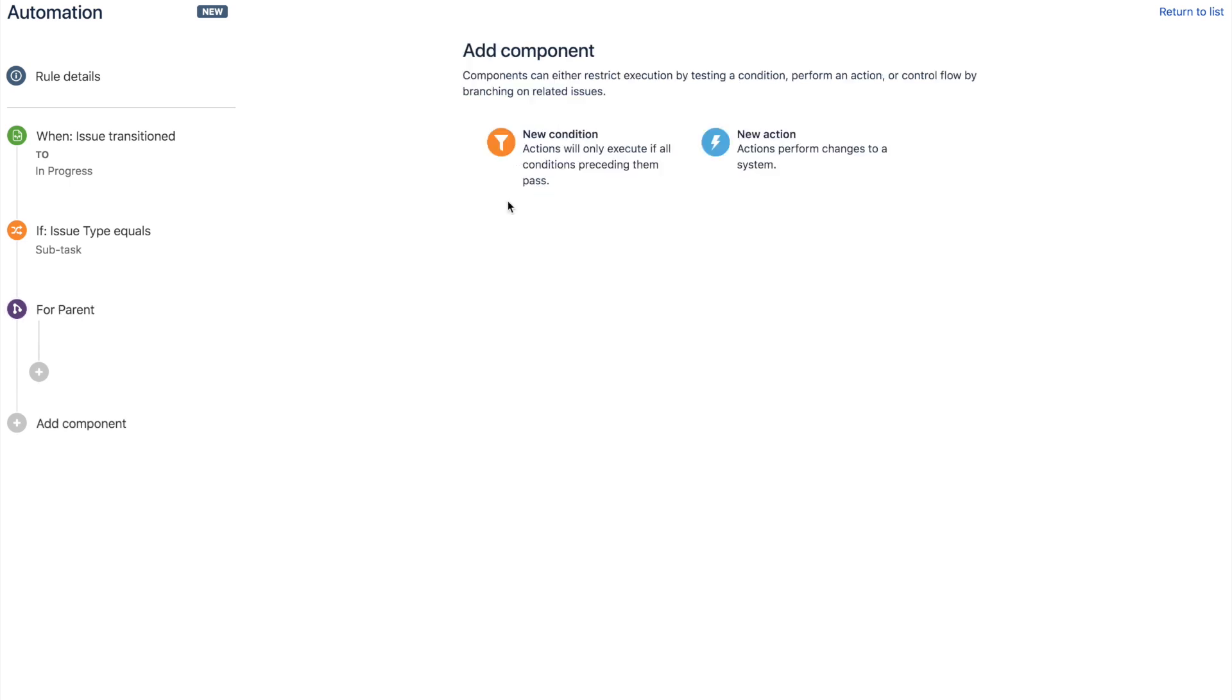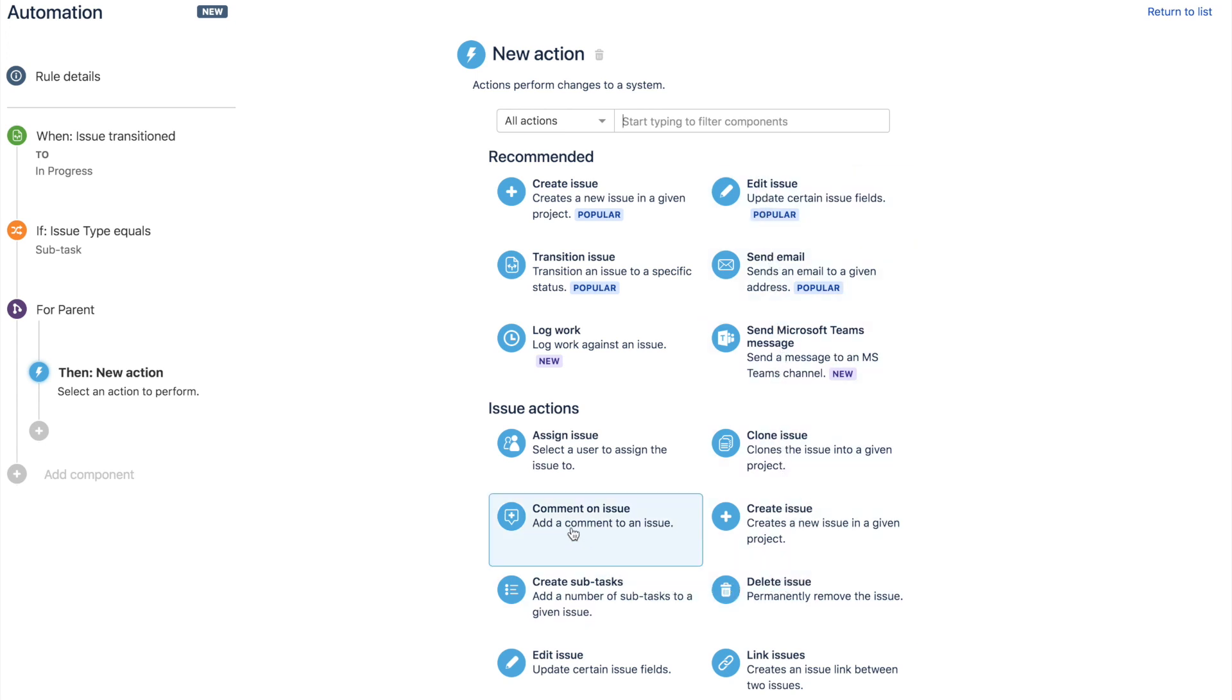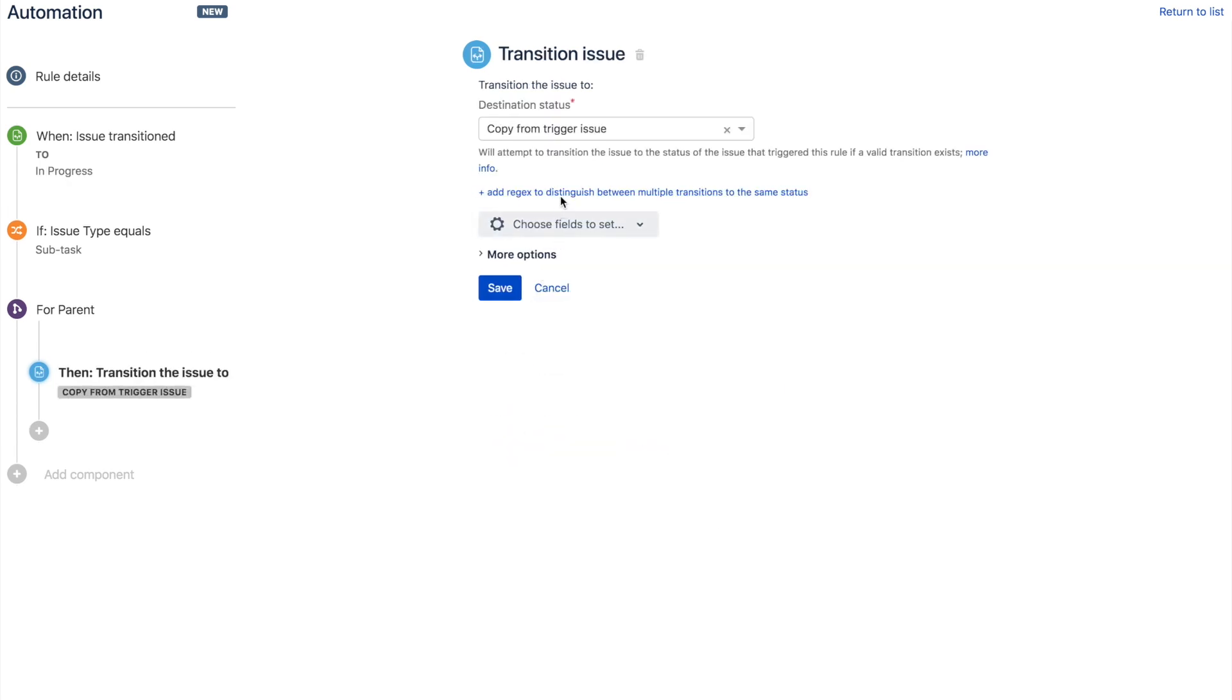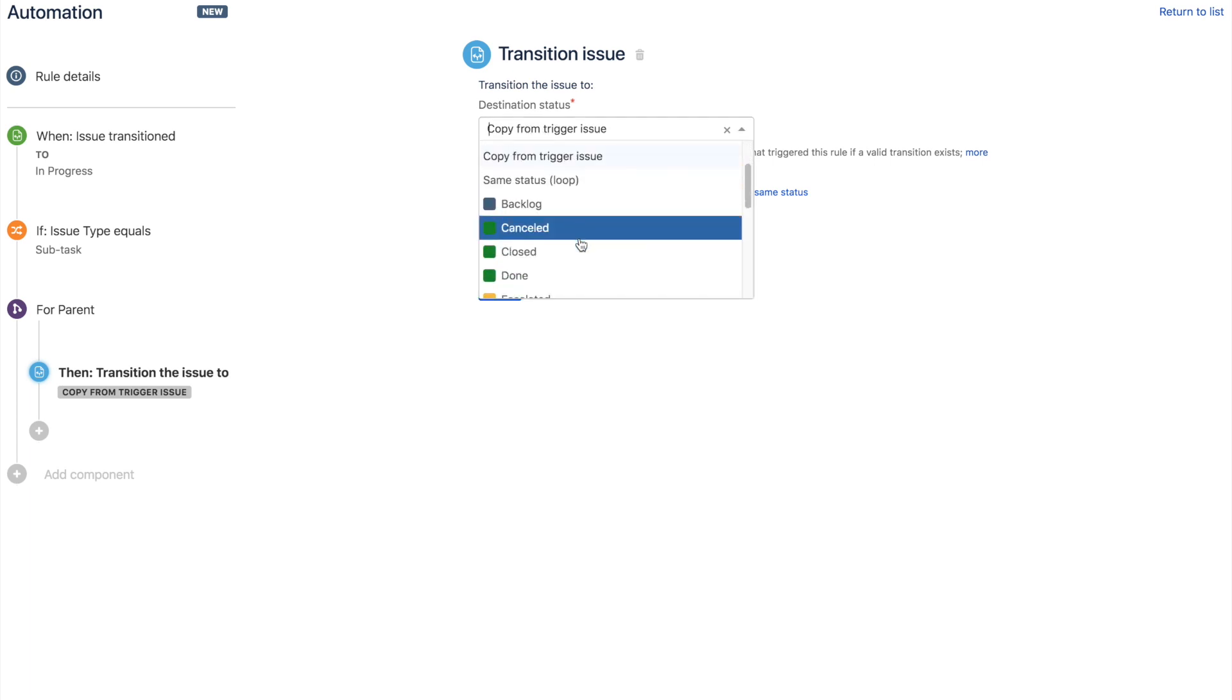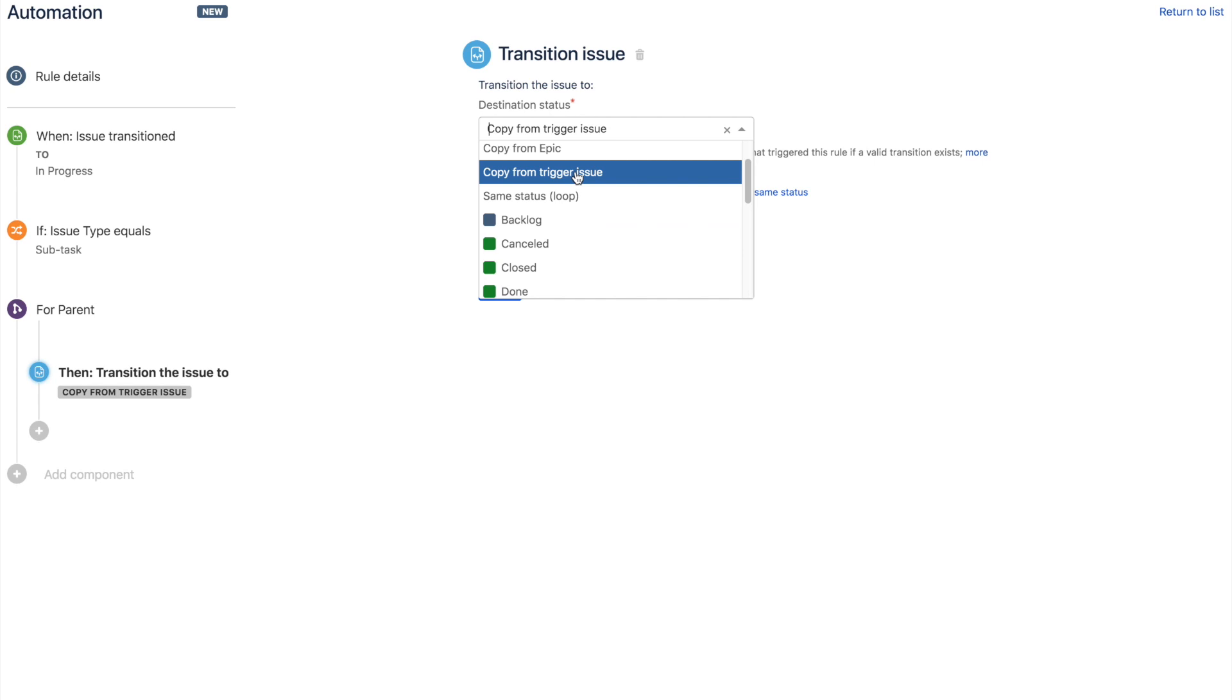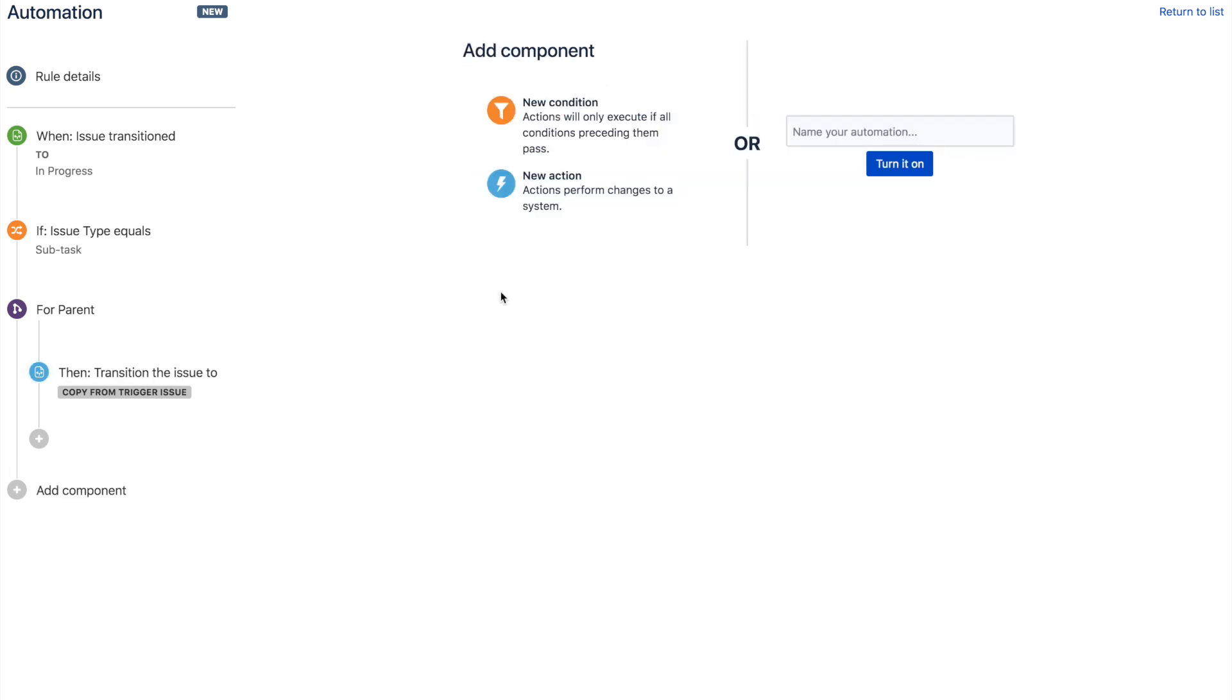And the last step and only the fourth building block is our action. So once again, tons of options. But in this case, it's a fairly simple rule. So all we're going to do is say transition the issue. So you could select the status that you wanted to transition to, such as in progress, but we can go one better and actually just say copy from the trigger issue. So that means that regardless of what happens with those subtasks, if it gets moved back to to do, the parent will follow suit. It just keeps them permanently in sync.